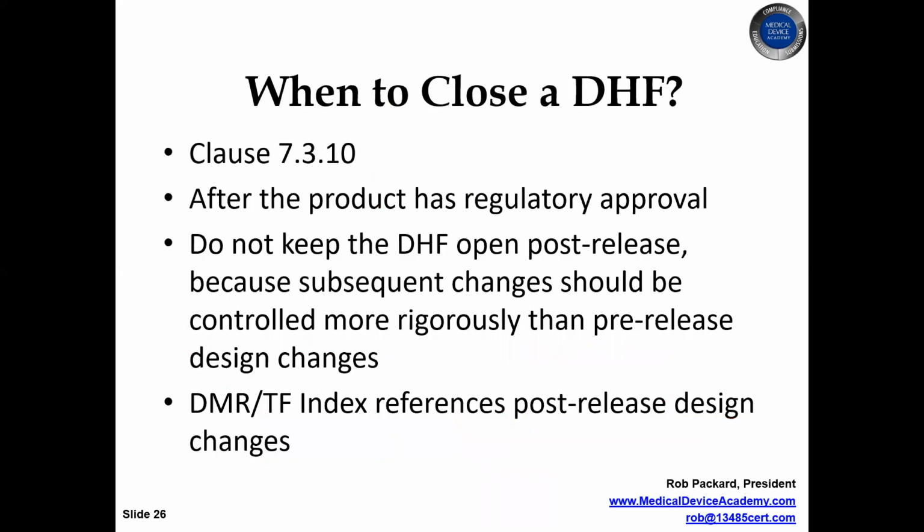So when do you close the DHF? A lot of people keep their DHF open and they keep on updating it every single time they do a design change. That's not the way you want to do it. Even the FDA has recommended don't keep your DHF open after you've gotten a 510K clearance. It's much easier for an inspector to review a DHF if it's tied to a 510K release. If you make post-release changes, so you got your 510K, you release the product, and now you make a change, those should be letters to file, and they should be an update to your DMR and your technical file, but they shouldn't be an update to your DHF.